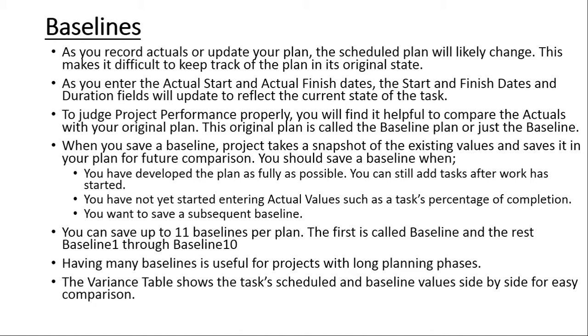plan for a few months, you get to a certain stage, you save the baseline at that stage. Then you develop again, save another baseline. So you are having a number of different snapshots to which you can always roll back. If, for example, you mess up your plan later on, before you start executing, and you want to go back to a previous version of the plan.